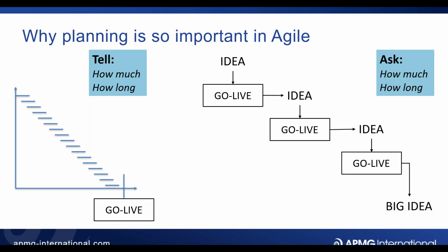So maybe that's when you start to think, okay, maybe we'll put change into the business every 6 weeks to 2 months, but let's not do it every single fortnight. What I'm saying is, it's almost like there's an algorithm based on the factors of how many times you want to disrupt the business, how early you need to get return on investment, and how you can group the work together in a way that makes sense for you.